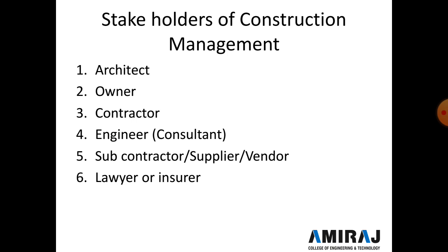The contractor submits the running bill for payment based on the progress of the work and material brought to the site. The proper interaction between the construction team, like owner, engineer, architect, and contractor, leads to smooth and efficient execution of the construction project.